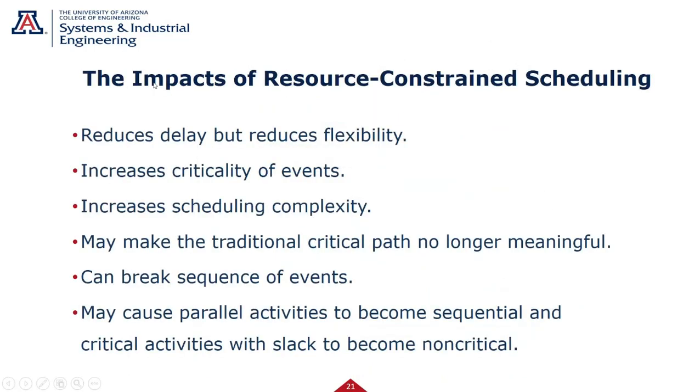So what's the impact of resource constrained? I think you've seen all that. Reduces delays, but reduces flexibility. So what do I mean by reduces delays? I mean, we've scheduled this out, and with our resource limit, the best way we can. So it reduces how much we're extending the project the best we can. We know we're going to, generally speaking, have some delay, but it does the best job it can